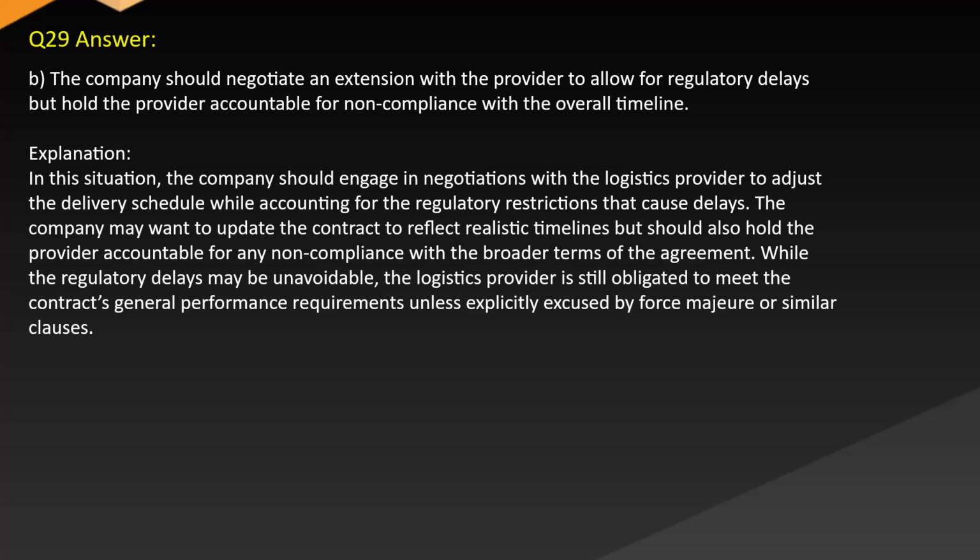It should also hold the provider accountable for any non-compliance with the broader terms of the agreement. While the regulatory delays may be unavoidable, the logistics provider is still obligated to meet the contract's general performance requirements unless explicitly excused by force majeure or similar clauses.